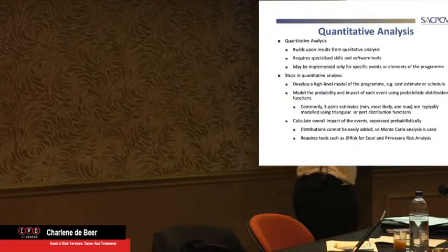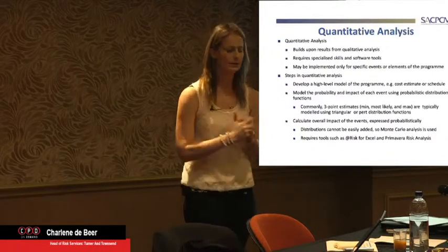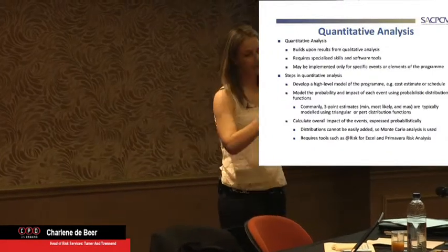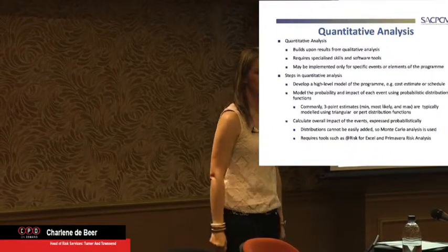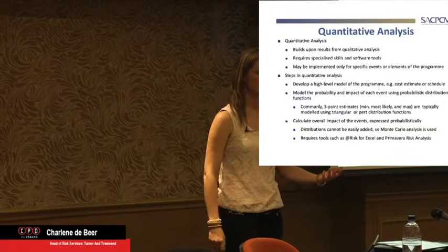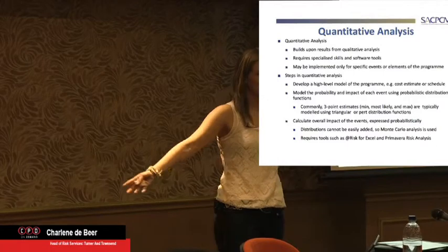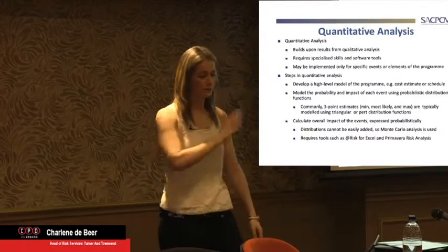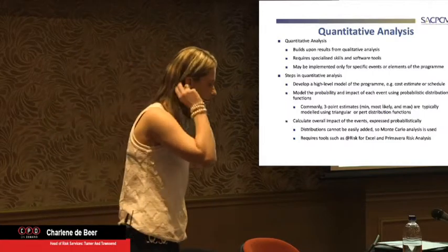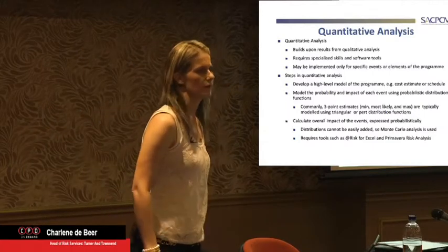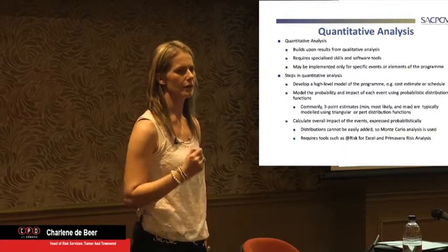The second risk register quant is, if I need to work out the cost, I will say, if this risk happens and this is the likelihood, what would your impact or overrun on schedule be? If we talk weeks, for example, he will tell me, well, it could be between 2 and 6 weeks. We're not quite sure. So let's peg minimum 2 weeks delayed, most likely 4 weeks, maximum 6 weeks. And then I'll show you how we derive a cost from that as well. Because people would always say, but how do you cost schedule?